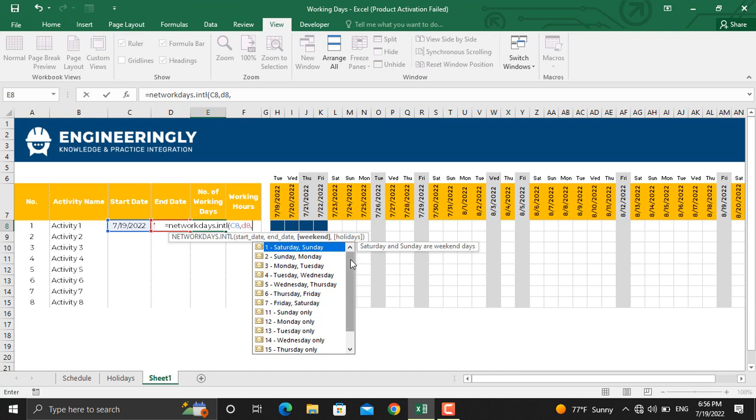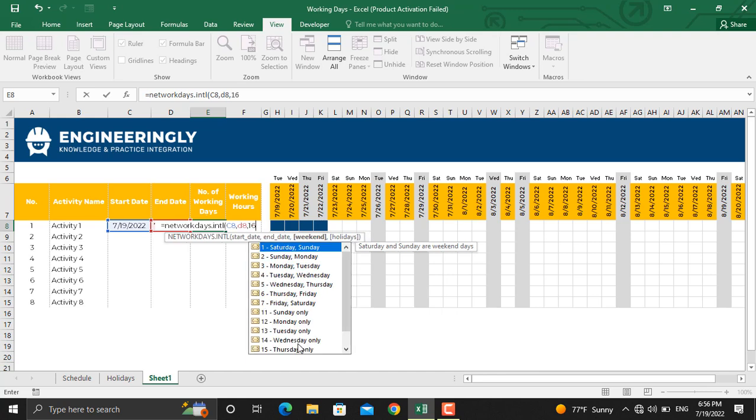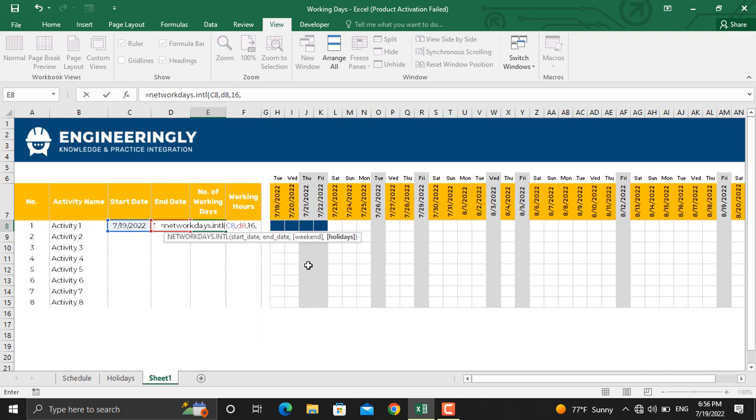The weekend, as you can see in here, a number of options are given to you as the weekend: the Saturday and Sunday, Sunday and Monday, and so on. I'll use only Fridays as my weekend, so I'll write down 16, and comma.